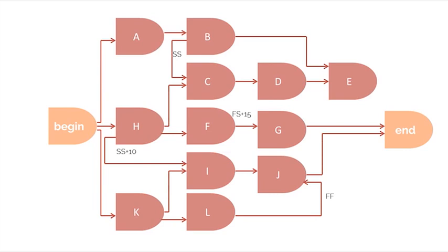In the context of project planning, a network diagram is a sequence of steps or activities commonly represented by boxes. They are linked together in the logical sequence they need to be carried out. Once the diagram has been completed, you have a clear picture of the required sequence of events and activities for your project. For example, you cannot start building your house foundation until you have first prepared and leveled the ground. It's important to include the project team in the development of the network diagram so you can get a consensus of understanding of how the project should be implemented.